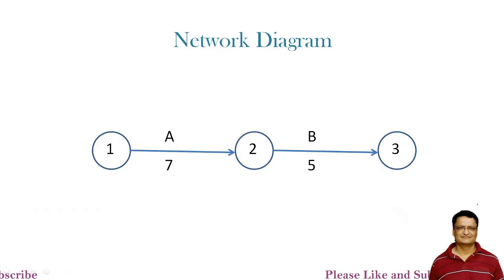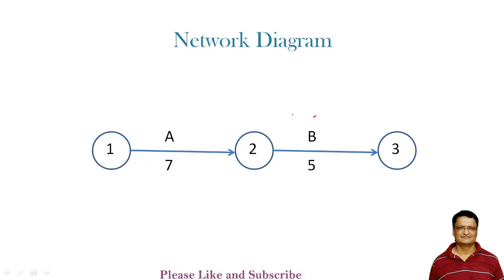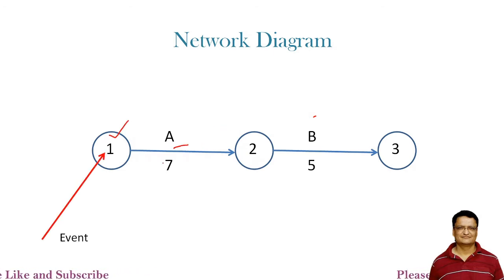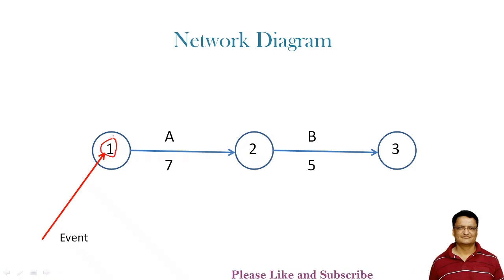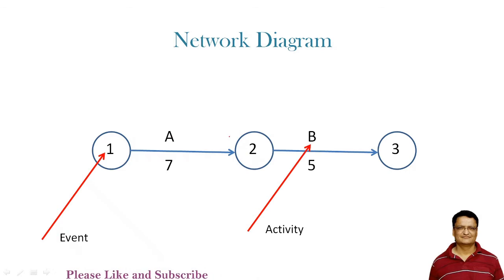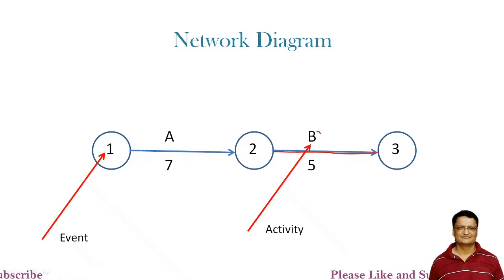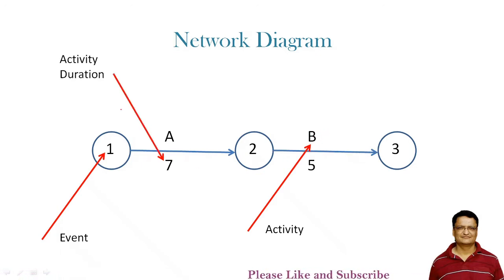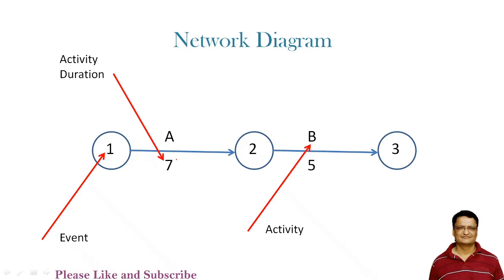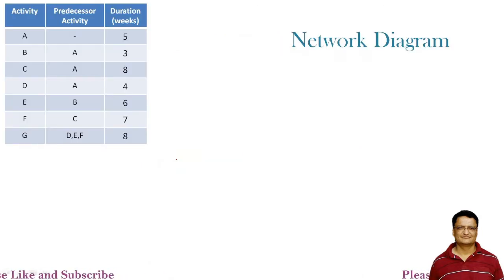Before we begin the PERT analysis, we need to understand how the network diagram is constructed. A network diagram consists of events and activities. An event is represented with a number inside a circle — the starting event is represented by number 1. An activity is represented by an arrow, with the activity name and duration shown below it. We will now construct the network diagram for the given problem.